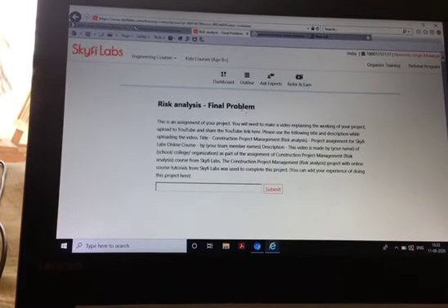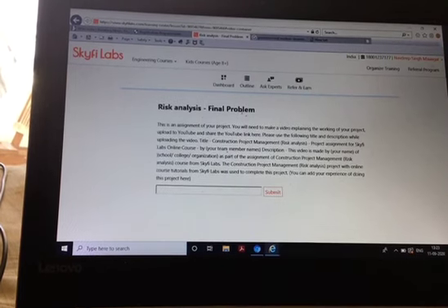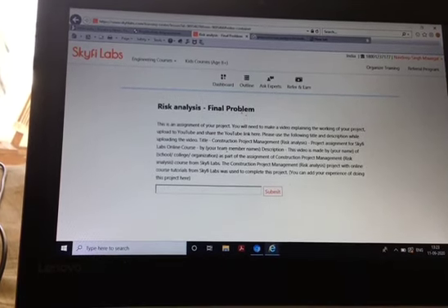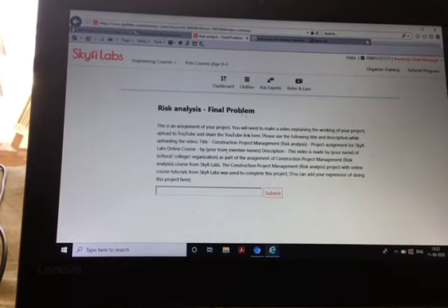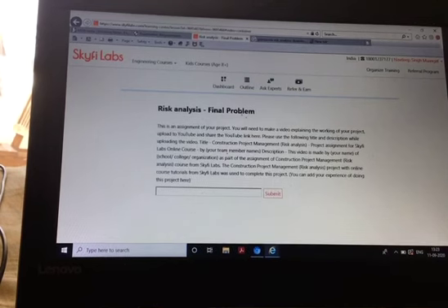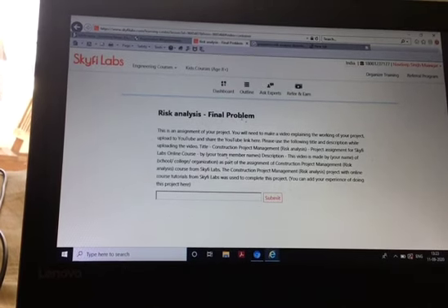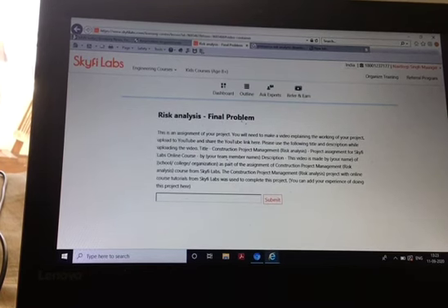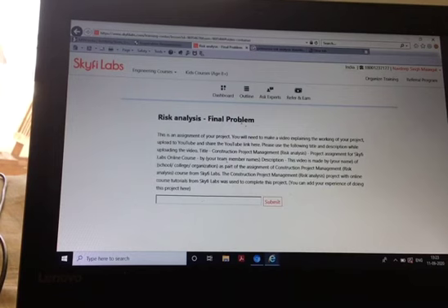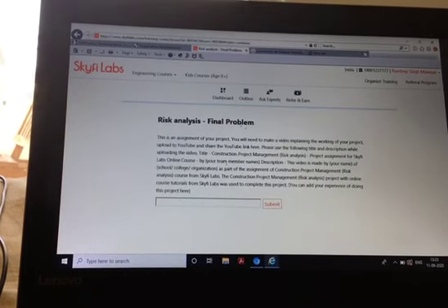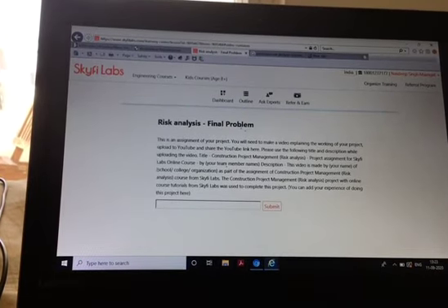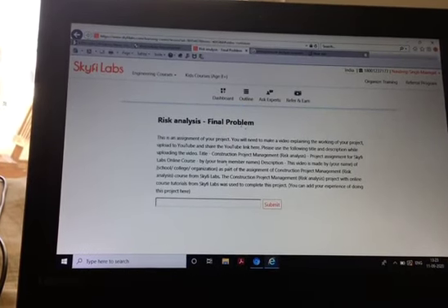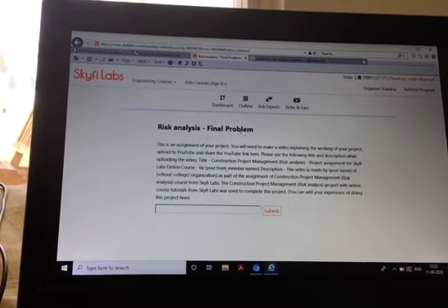And then we obtain a Z score, just like a logarithmic table. It has a formula, and when we get the Z score, we get the percentage, the probability that this particular project will be completed in this much time. So it uses the normal distribution table. As I said, a logarithmic type table. It is called the normal distribution table.